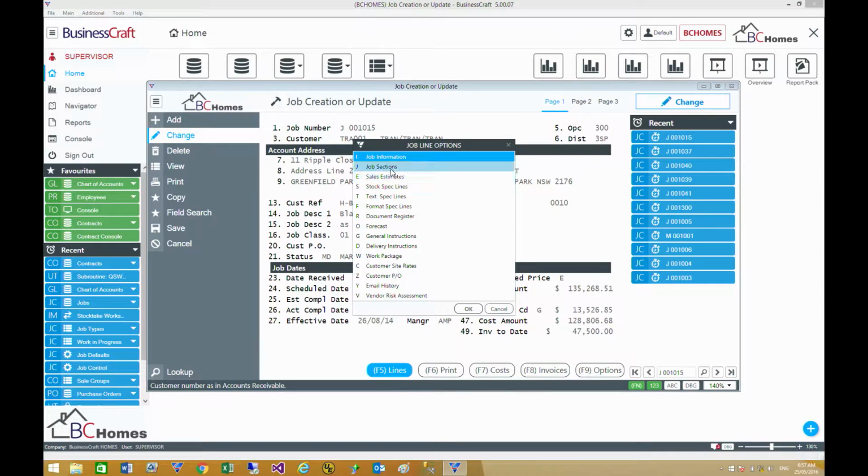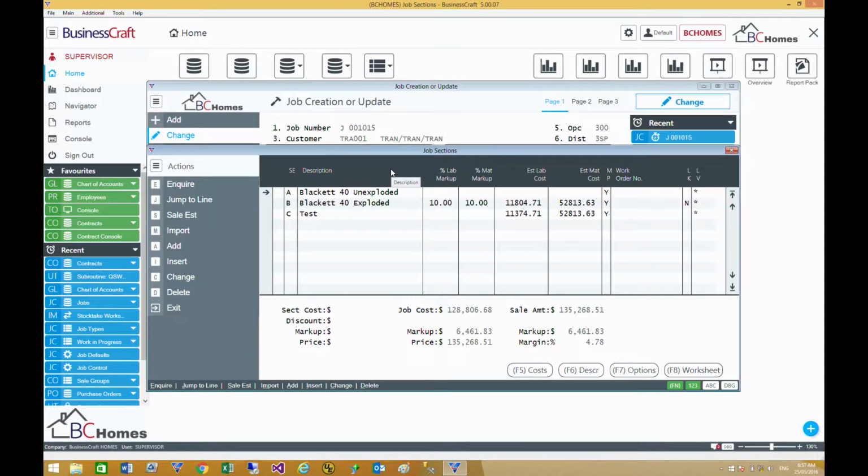We do a fairly detailed cost breakdown or estimate of the job, where we go down to cost centres, then cost centres go down to bills of materials, bills of materials go down to cutting lists. So it's quite a detailed breakdown that we do. A lot of your systems are probably similar.